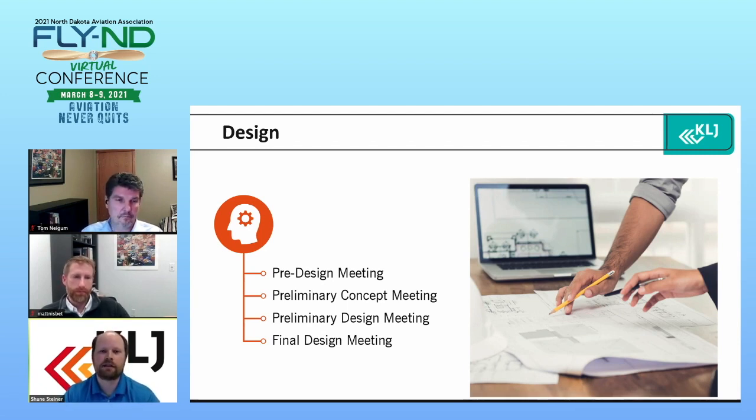So then after that, that's the home stretch, right? We see the light at the end of the tunnel for that final design. With the final design meeting, we take everything from the concept meeting, the preliminary design, everything from the stakeholders. So hopefully that final meeting is just the frosting on the cake, so to speak. Everything is involved, and everything is nearly about 90% complete. So any last minute quirks can come up at that final meeting, and from then we can finalize the plans and the specifications.